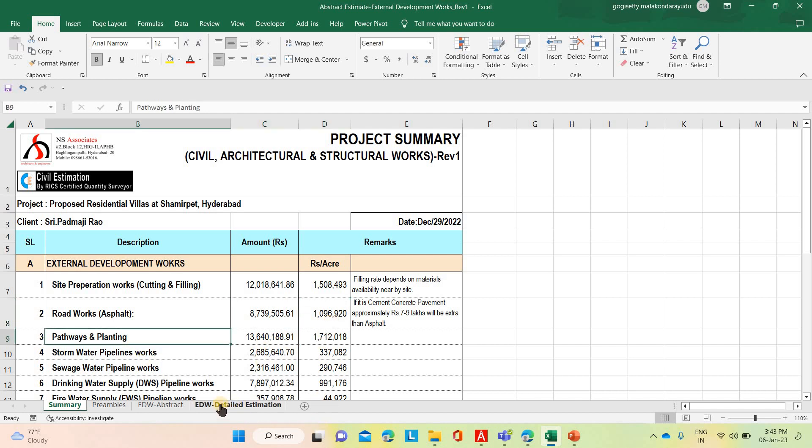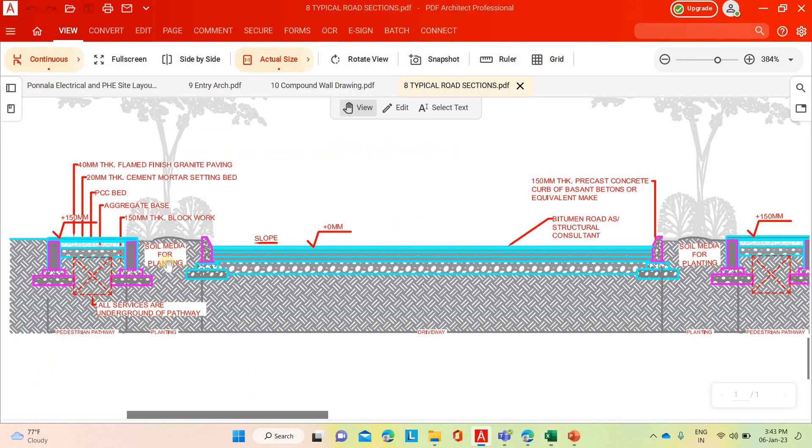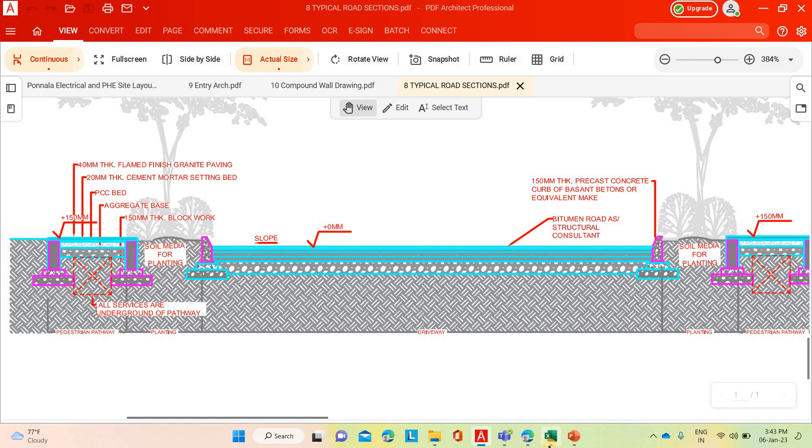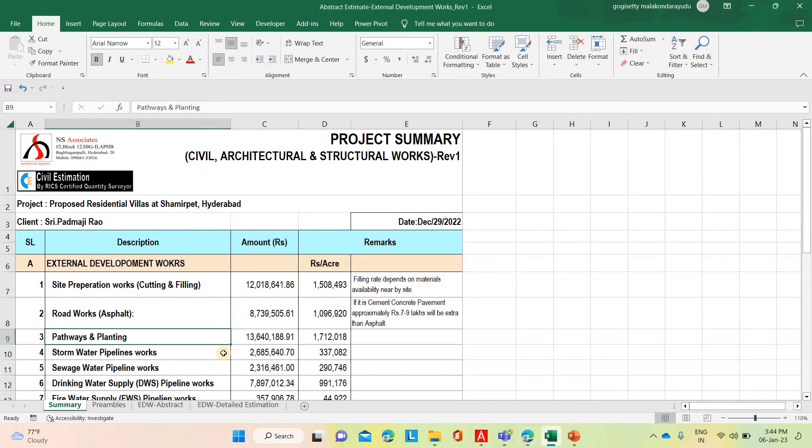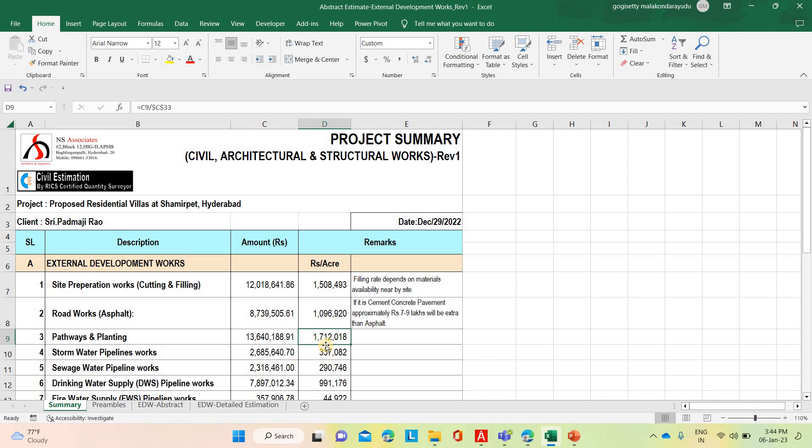Similarly, pathways. Pathways in the sense, I told you earlier, these are the pathways. For this, supporting one concrete wall is coming, then soil media for filling, planting soil, fertile soil and the carpet grass. Everything we need to consider based on the architectural requirement and the client requirement. Then it is coming 1 crore 36 lakh 40,188. In terms of per acre it is coming 17 lakh 12,008.